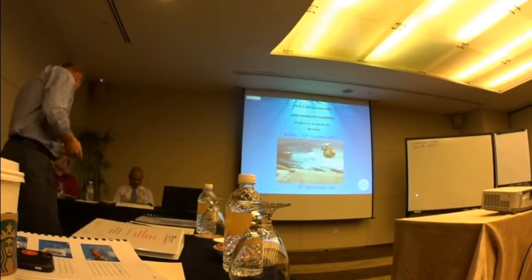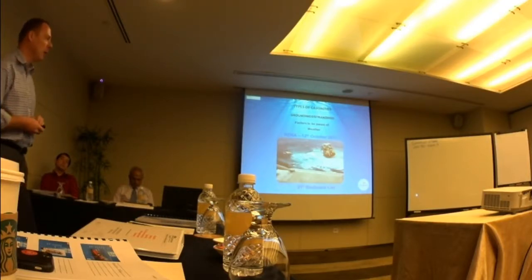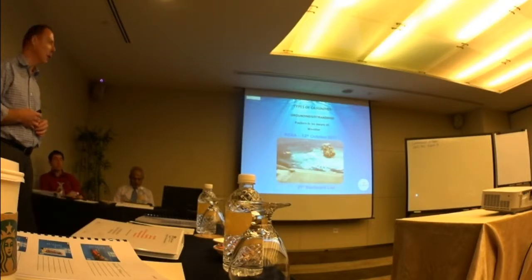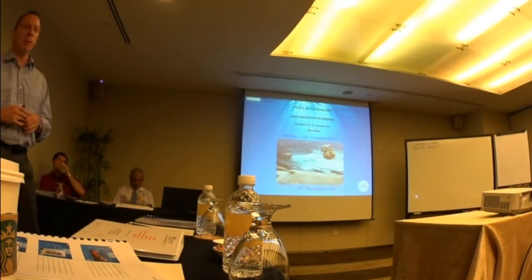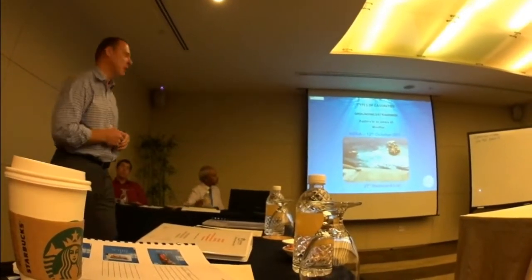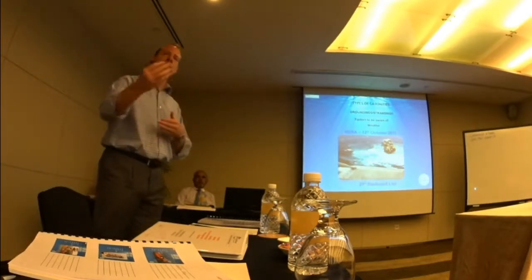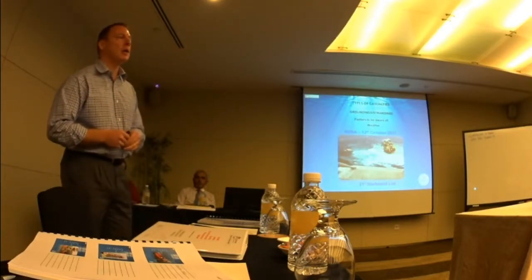Just out of curiosity, what was the daily burn of the entire ship? Yeah, I think there were various stages of this operation, but you sometimes went into a range of about 250 to $350,000 a day. I think for the first 3 months, it was $90 million. So $1 million a day, all in all. For the first emergency response part. Later on in the initial stage as well, there was a crane barge mobilized from Singapore to New Zealand. So yeah, an exceptional situation, of course.